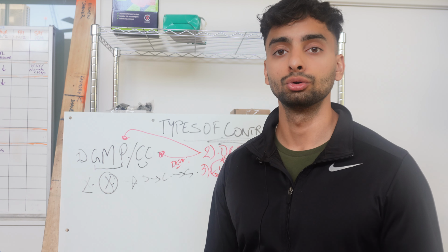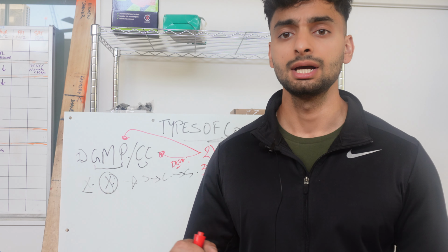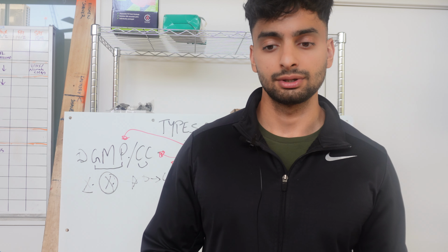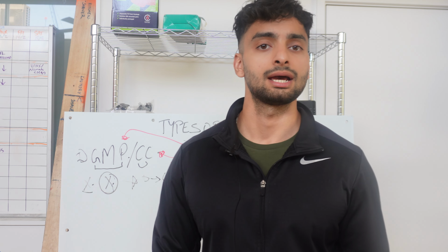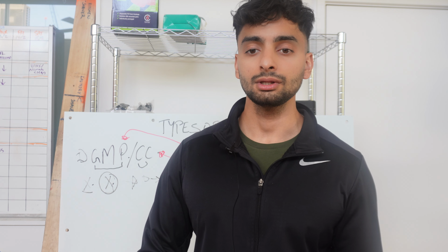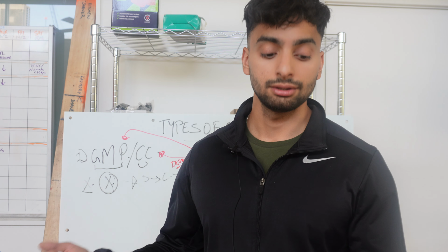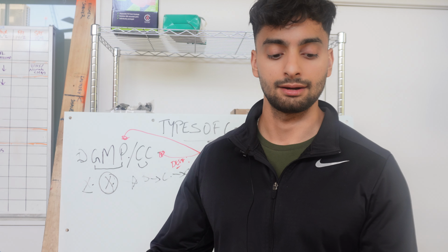So you are more looking for a time and material cost, where you tell the subcontractor, hire them at your risk and your knowledge, give them a scope of works and tell them, look, I need this bathroom renovated in 2 weeks, and you need to supply me with the labor, and I will give you the materials, and then we'll get the thing done. So usually, like I said, those contracts are used more at your lower tier levels.